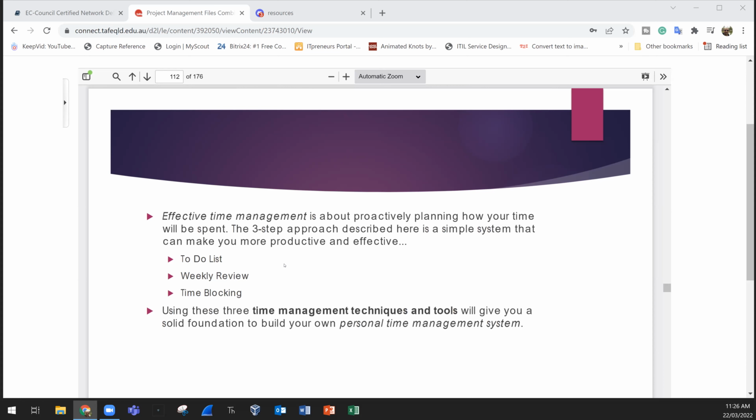So we need to think about cost. If I am hiring more people, I'm paying more money. If I'm delivering training, training will cost some money. Sometimes the training will cost double because I'm paying for the cost of training and also I'm losing the money of non-productive days while they are attending training. So it can be that big.